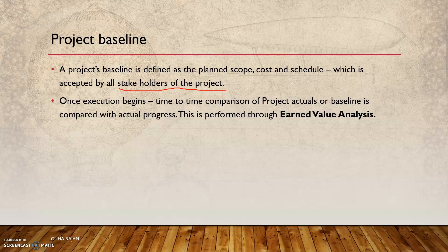Why is that baseline very important? Once the execution of the project begins, periodically — on a quarterly basis, a monthly basis, or whenever required by management — the project manager performs a comparison between the actuals versus the baseline.